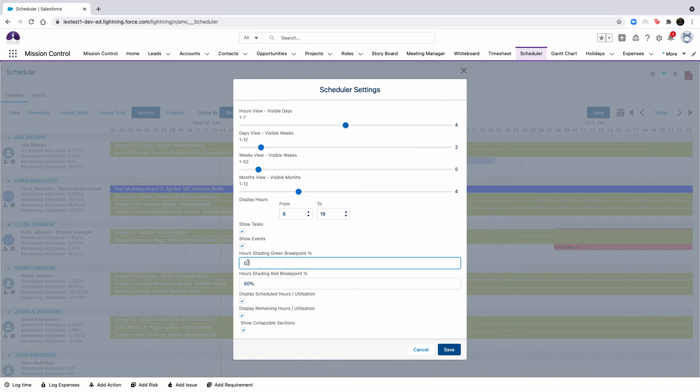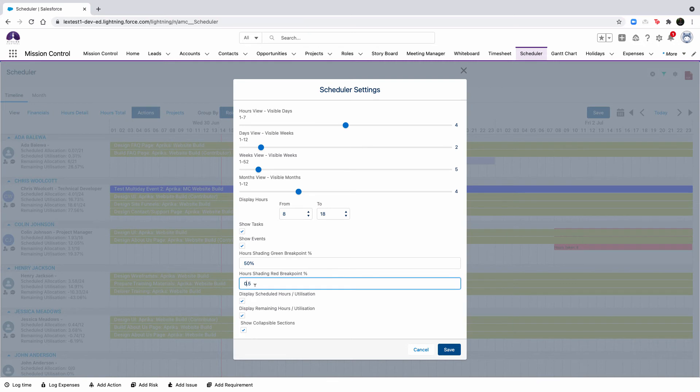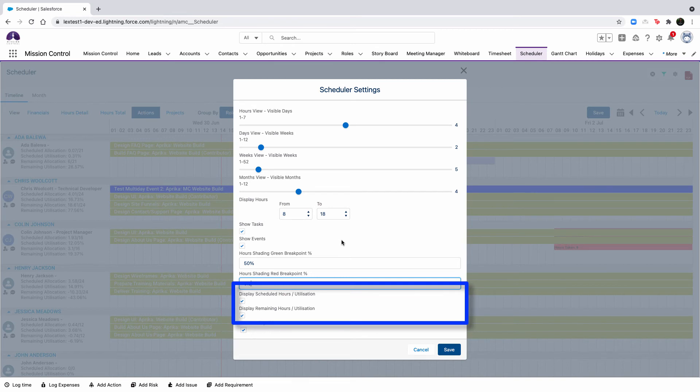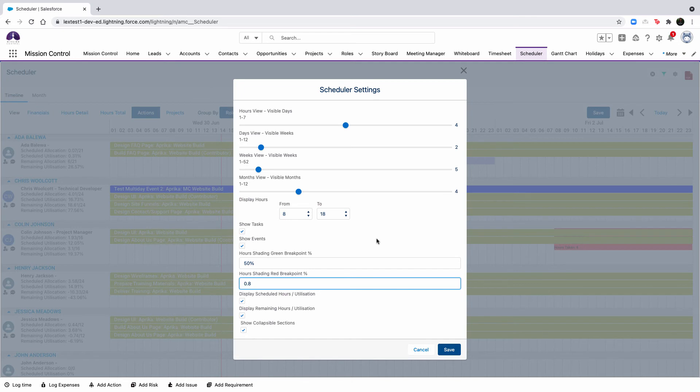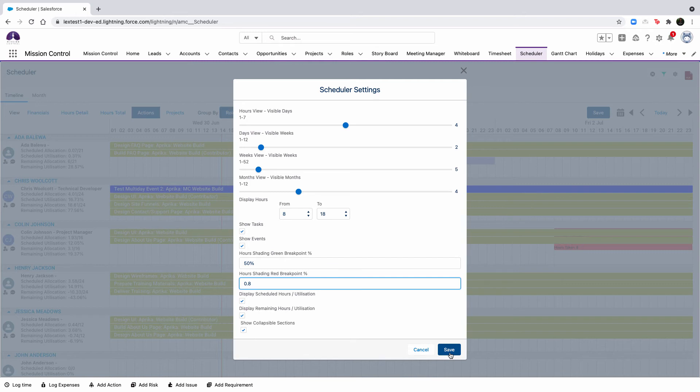You can show tasks and events on the scheduler by marking the checkboxes to true. The hour shading green breakpoint percentage will be used if the sum of the hours scheduled for a role is less or equal to this value, the cell will be shaded green. For the hour shading red breakpoint, if the sum of the hours scheduled for a role is greater or equal to this value, the cell will be shaded red. The displayed schedule hours and utilization checkboxes as well as the displayed remaining hours and utilization checkbox will allow you to toggle on and off the view of the scheduled and remaining allocation and utilization figures for each role.